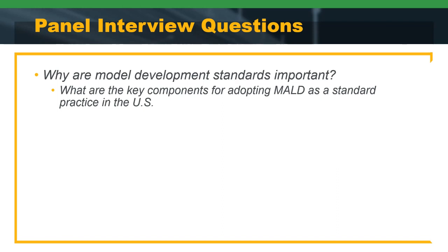So that way, Eric on the backside understands, element by element, the accuracy of the information, even starting with the accuracy of the survey and the utility information that the design was based on. And also, what are the specific BIM uses for the information and limitations? And who's the engineer of record if it's a contractual digital deliverable. So I think that's really important.